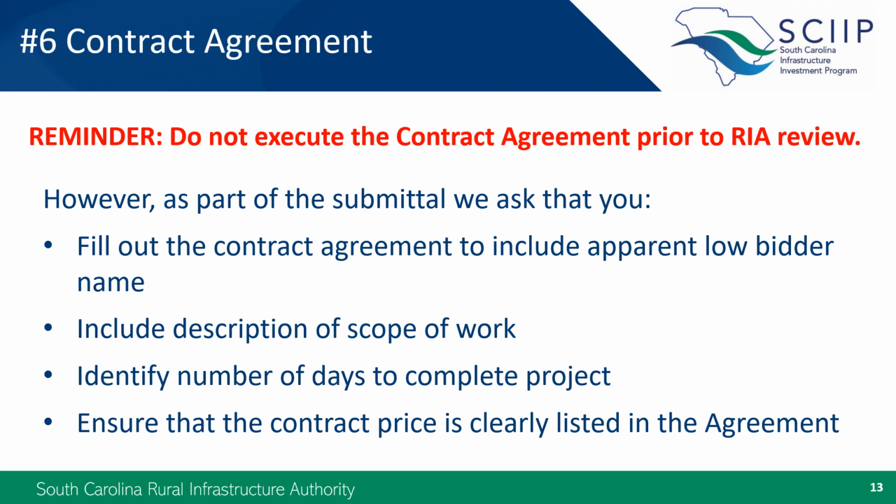Also, if you are using EJCDC or AIA contract docs, there is standard language in the agreement which states that past due payments to the contractor will bear interest. Because interest payments cannot be made using SCIIP grant funds, this is a common item that requires a memo response from RIA.